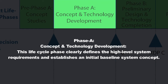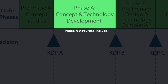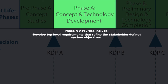So in Phase A, you're making sure that high-level objectives are starting to be decomposed into lower levels of requirements — we're now calling them requirements — that will allow the system developers to provide more specificity and detail to all the components of the spacecraft. Specific activities in Phase A include developing top-level requirements. 'Top-level' refers to the first level of requirements that are under the system objectives, with stakeholder objectives at the higher level.